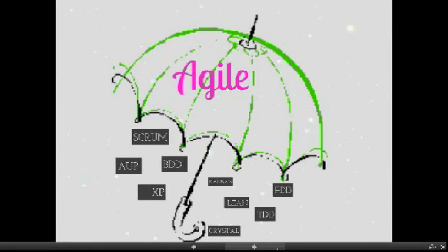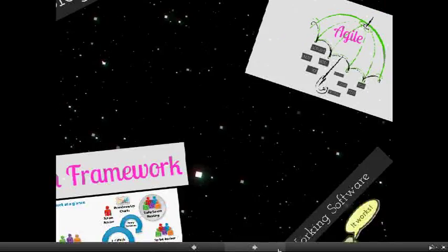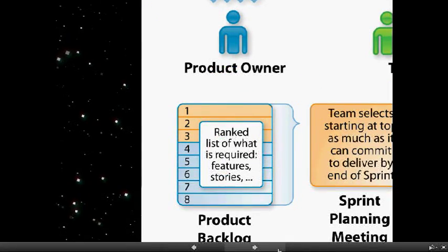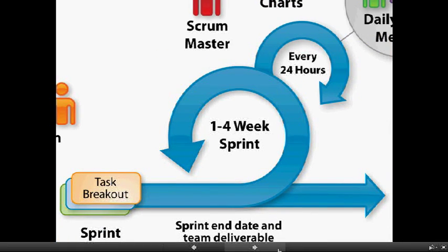As we've got very little time, let me give you an overview about agile development using the Scrum framework, which is one of the famous agile methodologies used in software development. The process starts by creating a product backlog by the product owner. Backlog contains a prioritized list of tasks to be achieved by the product. A widely used terminology in Scrum is sprint. It is the basic unit of development time. The project is made up of several sprints.